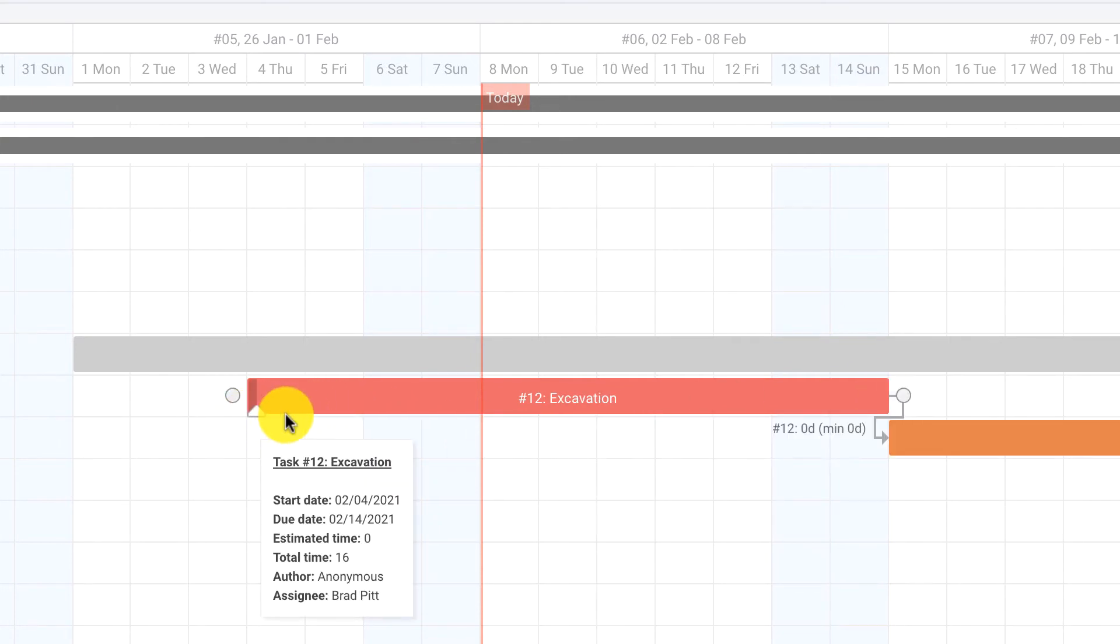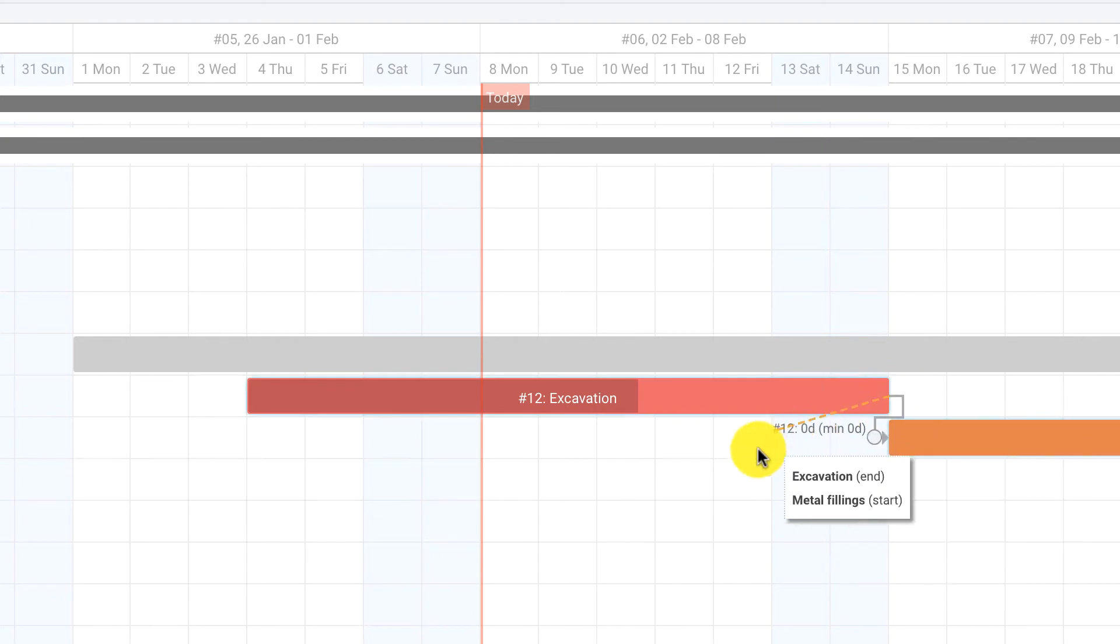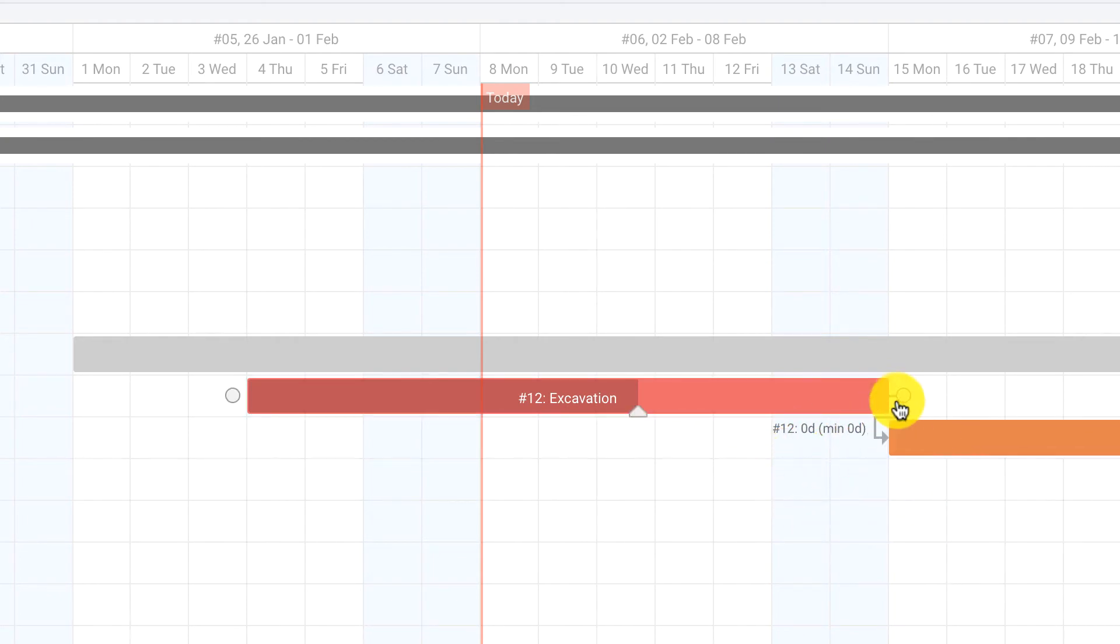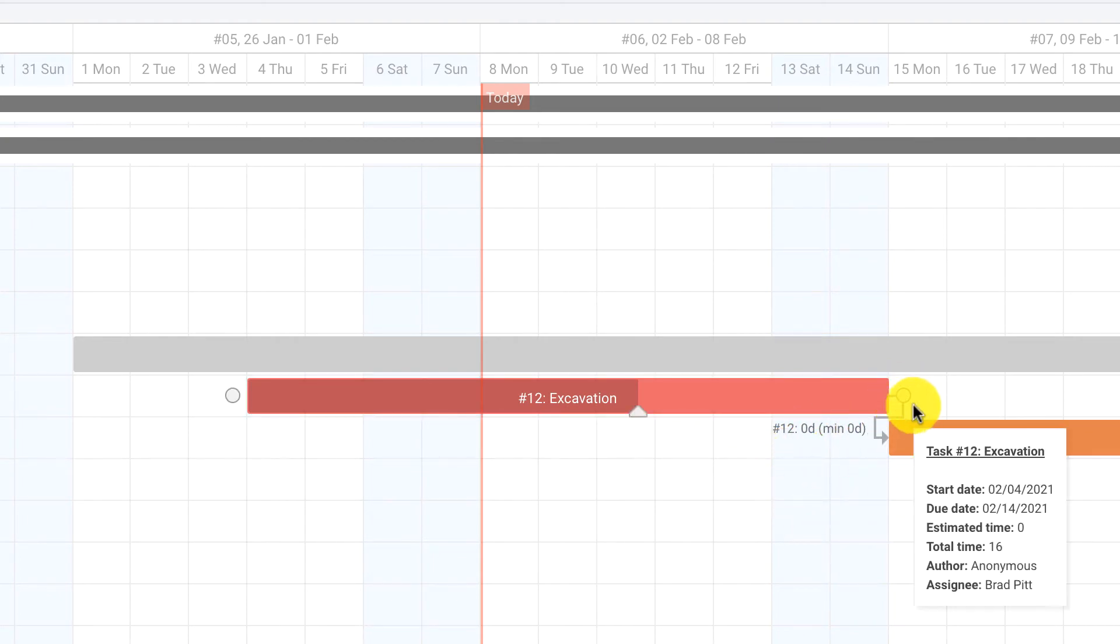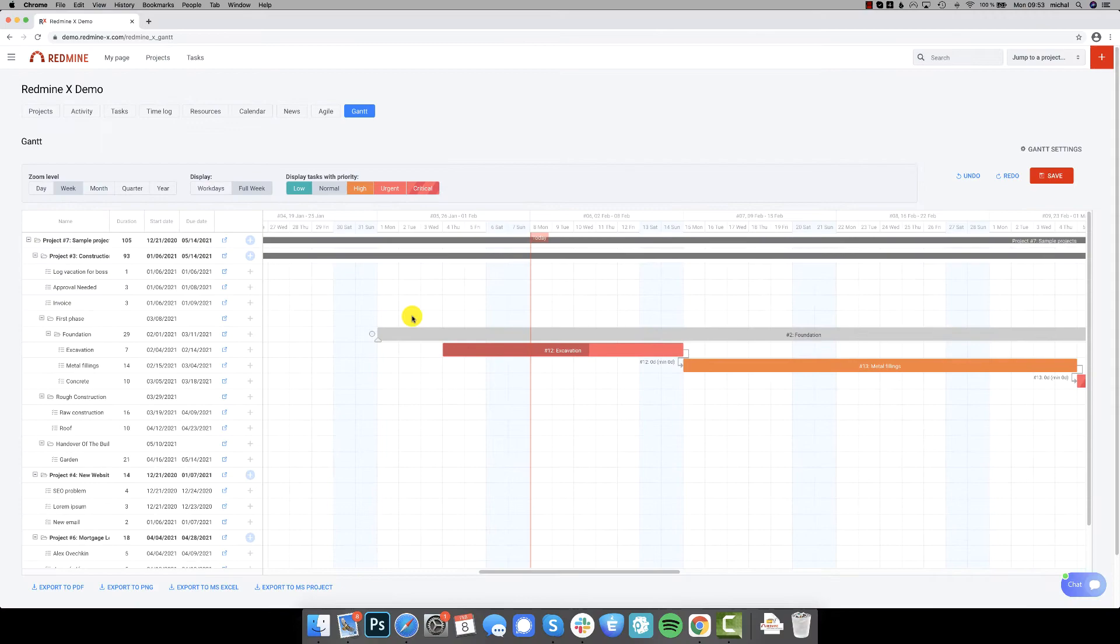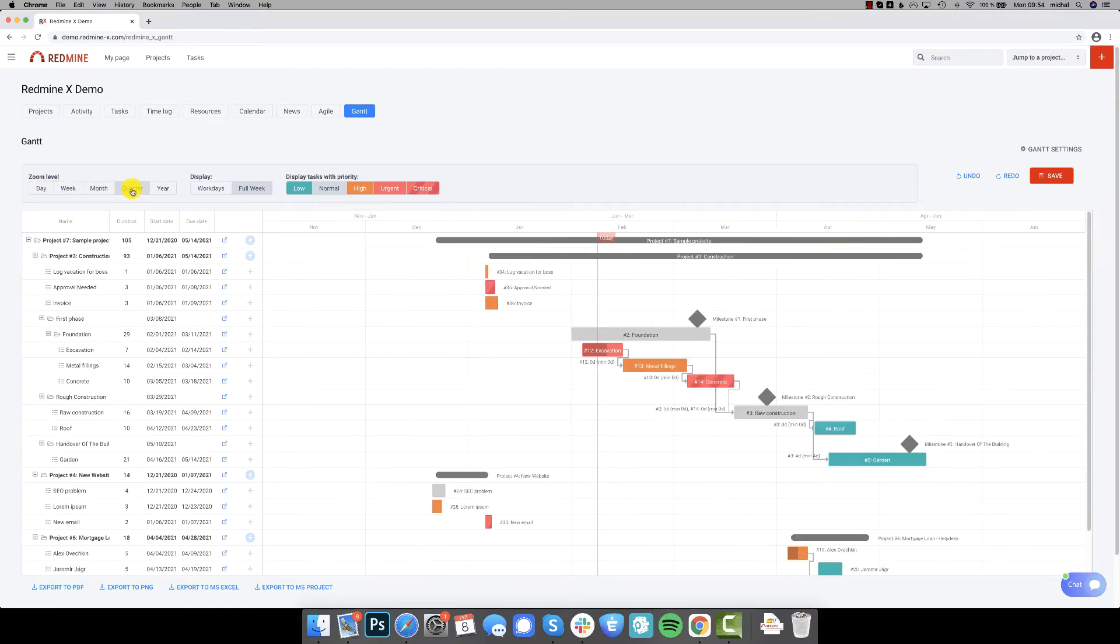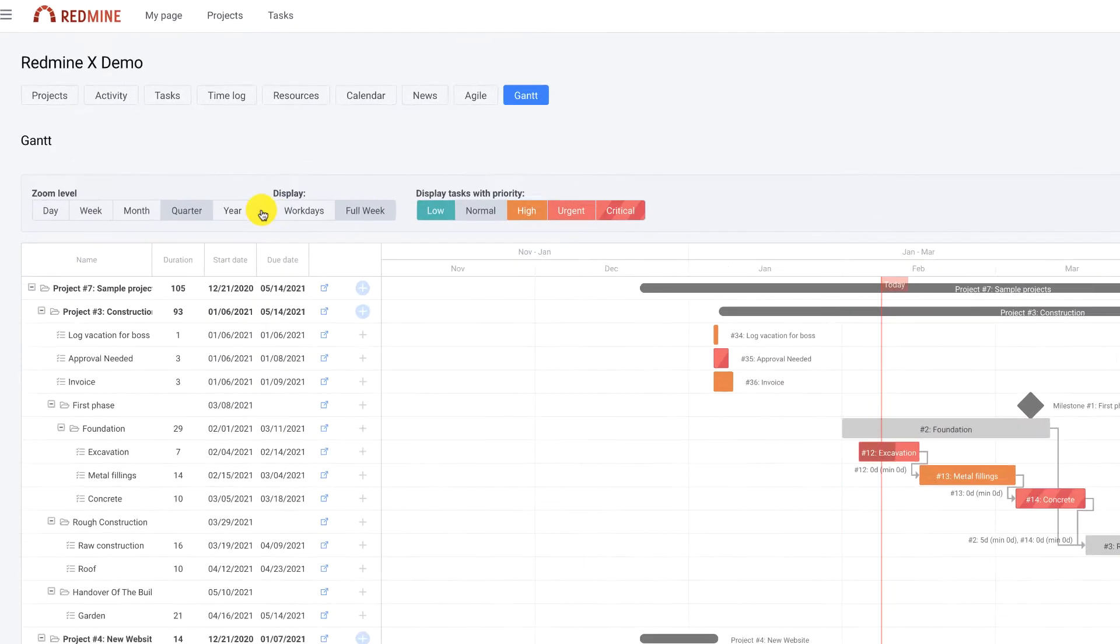And using the same drag feature you can change the task's completion. And if you want to create relations between tasks you can intuitively use the drag-and-drop feature like this. If you want to see the big picture or filter the tasks just use the top section.